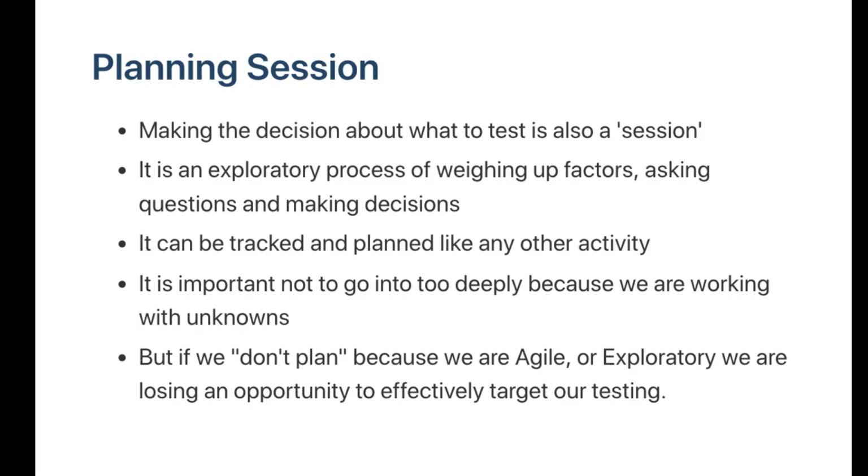One of the issues that I think people have with planning, they get nervous that they've got to plan it in real detail. But we don't. We go as deeply into it as we currently understand based on the models that we have in our heads. Sometimes the planning process will let us know that we don't really understand what we're about to do. Therefore, we know that it's going to be hard to estimate because we're working with unknowns. We know that we can't plan it in too much detail because it's liable to change. We know that we're working with variable information. Therefore, we don't want to write everything down to the last steps.